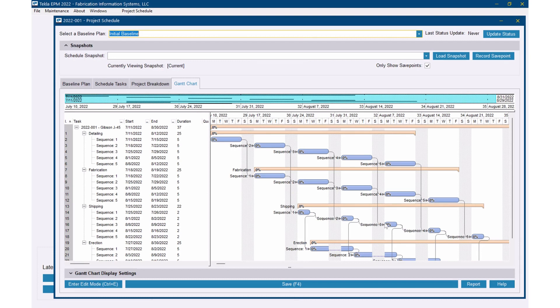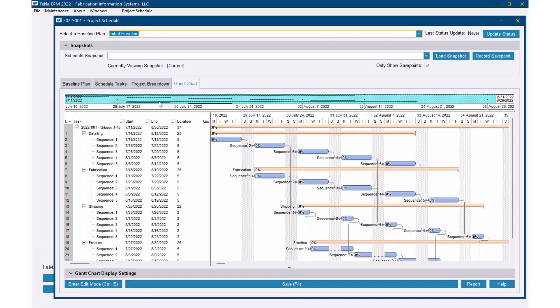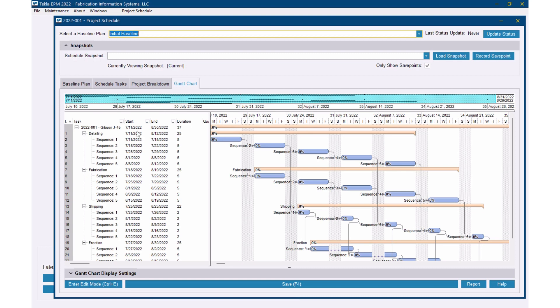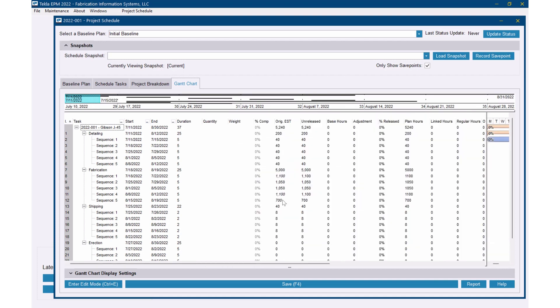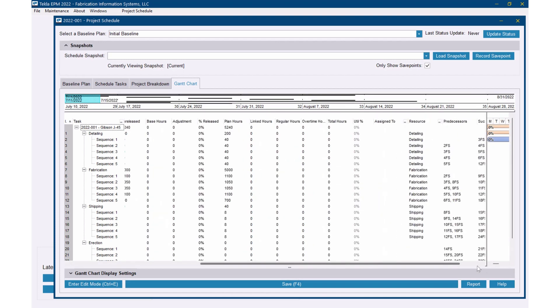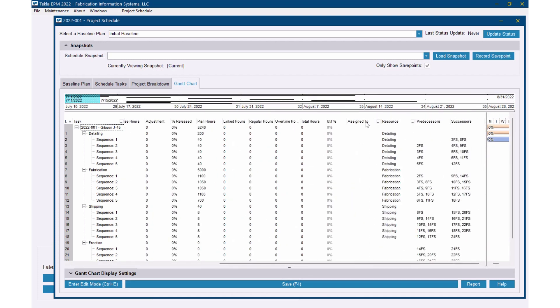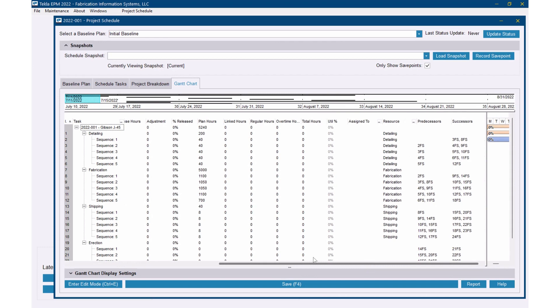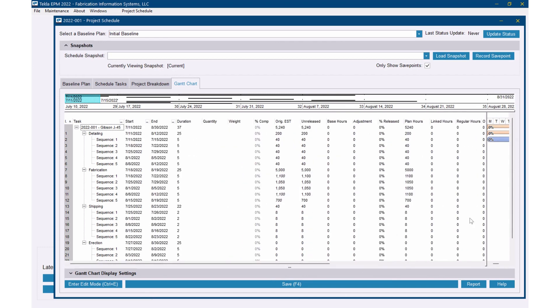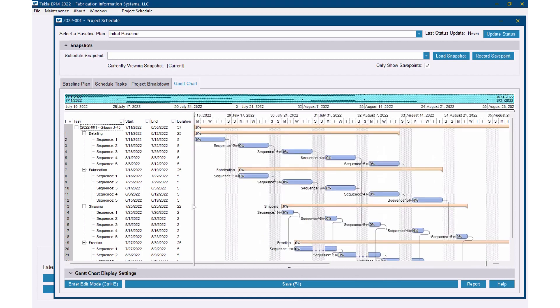I want to jump right into production schedule now. We've created project schedules - I actually have a couple other projects in here with schedules. But we created this project schedule, we've put in tasks and sequences, and just by entering dates and entering estimated hours and then assigning resources to those, we've already got a production schedule created just from doing this on the project schedule. So let me show you that.